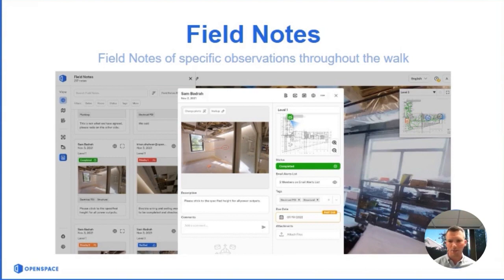So this is typically done by the person who's going to be capturing. We'll walk through if there's anything that needs to be punched or anything that's installed incorrectly. They can take a photo of that and assign a priority level to it, put in the description what needs to happen next, and if necessary, they can push it up to Procore through their Procore integration tool.